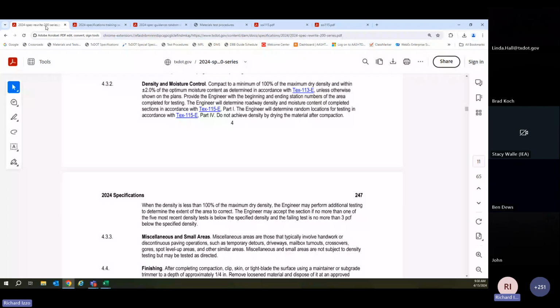We're not changing how y'all do business when something doesn't meet, right? If you're just taking your regular normal density reading, and that fails, we're not changing that. All that we're changing is saying, hey, if that number fails, you've got to rotate the gauge to validate and take an average. That's what changes. Now, if your final average doesn't meet, we're not changing what you normally do.